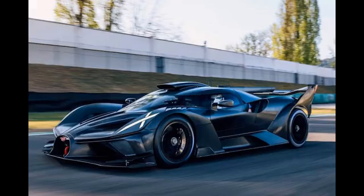By incorporating these strategies, Larry Jeffers race cars can gain a competitive edge by optimizing their budgets and maximizing their return on investment across their racing endeavors. Challenge 1. Budget pre-allocation. Scenario: budget is set before the project scope is finalized. Solution: work with the client to set realistic expectations on deliverables within the budget. Monitor expenses against the pre-allocated budget throughout the project. Track both fixed costs, milestone-based payments, and time and materials costs, monthly, based on work hours.